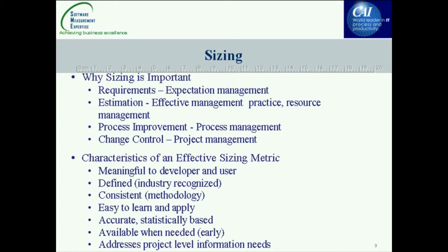Okay, so why is sizing important? Well, there are a lot of reasons. One is that we have to be able to size our requirements in order to manage our expectations. If we can't size, we can't do estimations of how much it's going to cost us to do a project, what the duration of the project might be, even defects we can expect to come out of our software project.